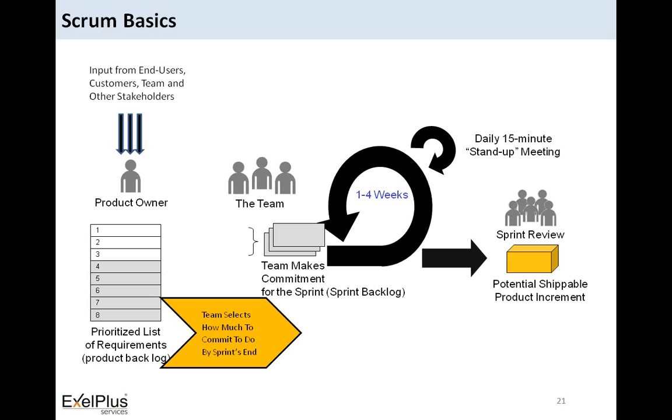And every day there will be a 15-minute daily stand-up meeting where every team member in Scrum presents and discusses 3 things. Each team member has to report just 3 things rather than discussing everything. He has to report what he did from yesterday to today, second, what he is going to do from today to tomorrow, and third, whether there is anything blocking him from accomplishing his work. These 3 things have to be reported by each and every team member in the daily stand-up meeting, which helps the team take stock of the situation and know any impediments for that day of work.